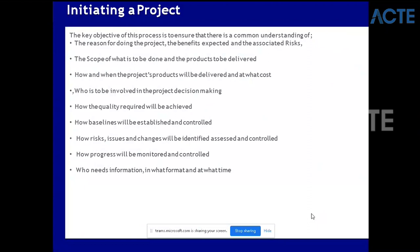In practice, these are things we need to do as part of initiation - ask and document these things. We need to write how governance will happen. Agree that governance will be weekly - every week there'll be a call, put a presentation. How we'll monitor progress - we will do some kind of Jira board or Kanban board and things like that. This is what you have to do in the initiation.